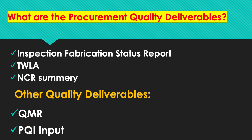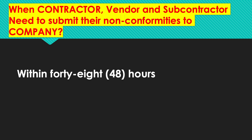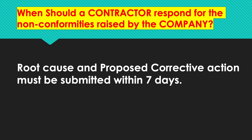When does a contractor or vendor or subcontractor need to submit their non-conformities to the company? Within 48 hours officially. When should a contractor respond to non-conformities raised by the company? Root cause and proposed corrective action must be submitted within seven days.